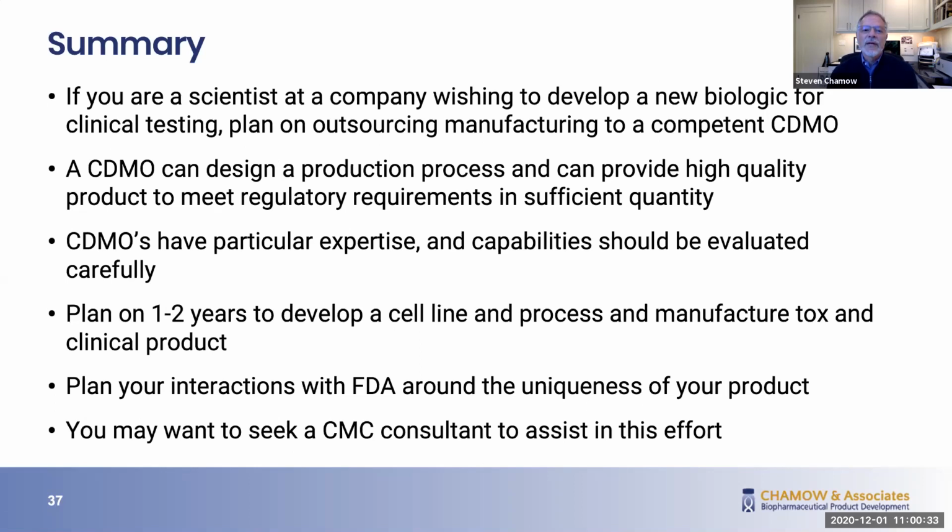Very importantly, as Tracy pointed out, CDMOs have particular expertise and their capabilities should be evaluated carefully. Plan on 1 to 2 years to develop a cell line and a process and to manufacture tox and clinical product. Plan your interactions with FDA around the uniqueness of your product. And you may want to seek a CMC consultant to assist in this effort.